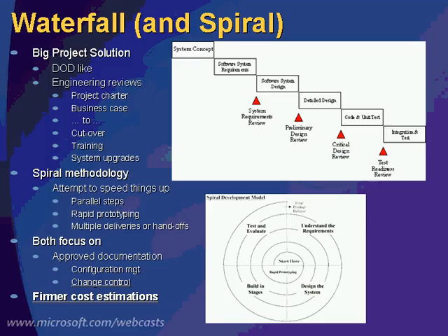So the waterfall approach is the big project approach where you would typically have all of your requirements defined up front, and they'd be signed off by executive management, and you would have clear orders in terms of exactly how the system is to look and feel and work, and you start working after you've created that vision, constructing it in different phases.